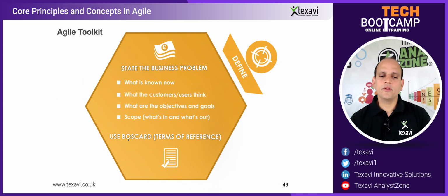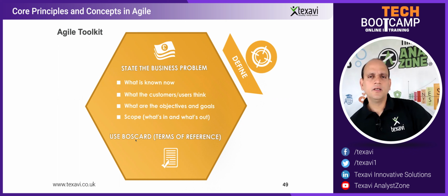what is the background? What are the objectives? What's the scope? Who are the customers? Who are the authority or the sign off? Who's got the responsibility? What are the dependencies? So that's called a boss card, a very valuable tool. I would suggest you use that to your advantage. I'll share that template. I've got a template and I'll share that with you.